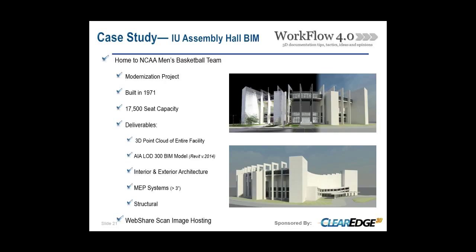We were brought into the fold because existing record drawings were poor and mostly outdated, so there wasn't a lot of confidence in moving ahead, and since the design was going to be completed in Revit, a starting point for generating a Revit model for the entire facility was a perfect starting point for both the designers and the university. Now, although some of the improvements were just going to be in specific parts of the building, the facility department opted to do an entire BIM model for the entire facility, both interior, exterior, MEP, and structure. So it was a very, very sizable project.